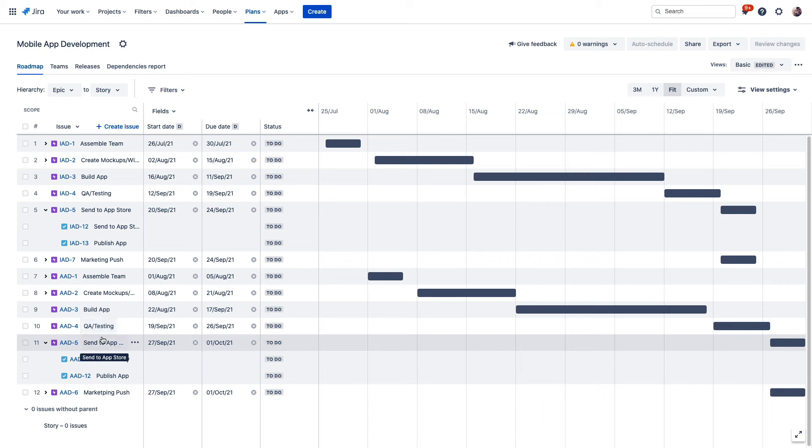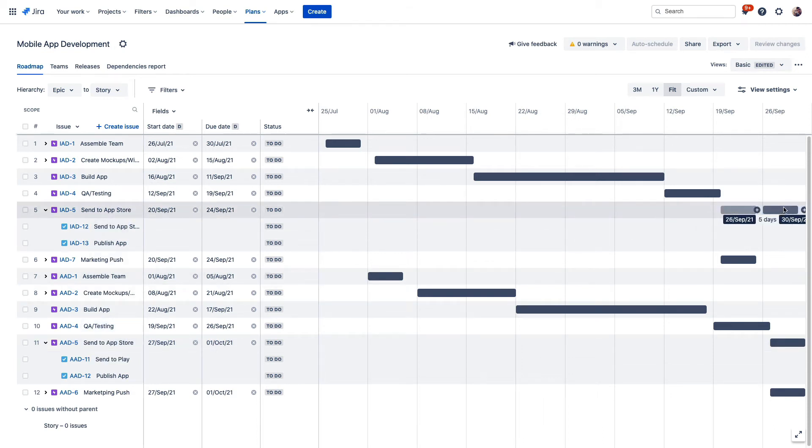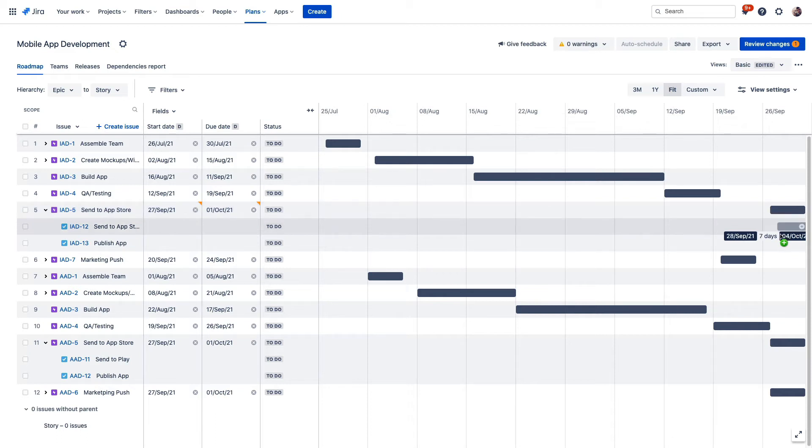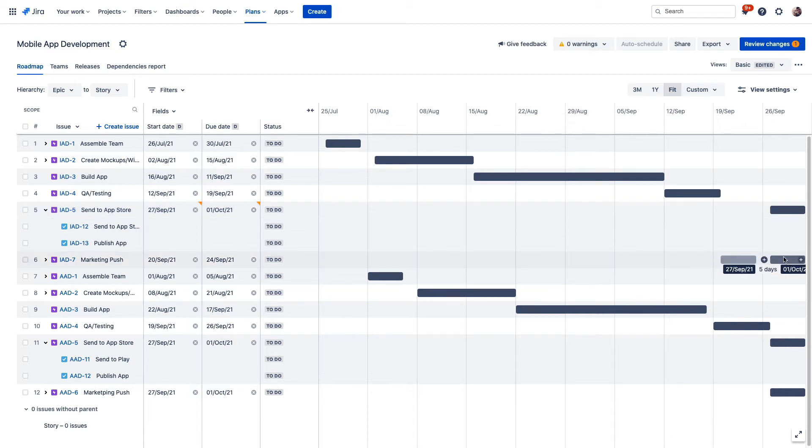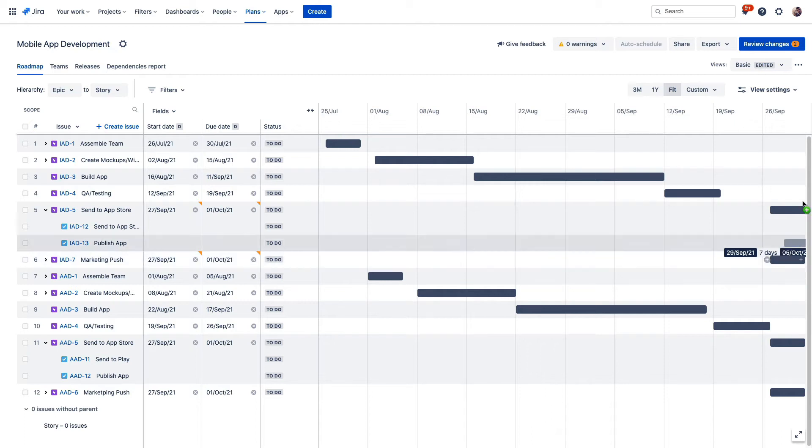You may want your iOS and Android apps to launch simultaneously, for example, and you can reflect that by dragging this bar to align with the corresponding Android epic to publish the app. We'll want to push the marketing campaign out as well to match the new target date for when the app goes live. The plan operates as a sandbox environment where you can make changes to multiple projects from this view with the additional context of all your relevant projects right here in front of you.